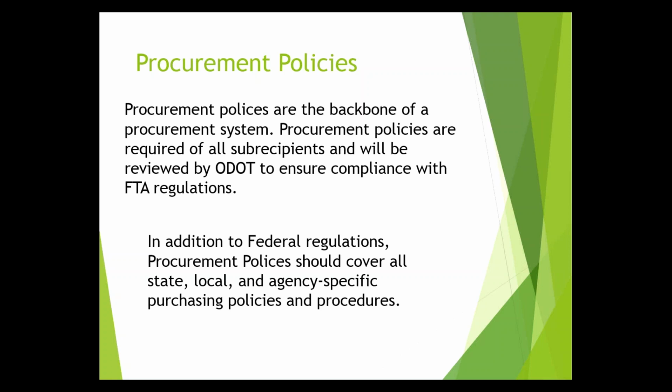In the course of reviewing some policies, I have found a couple where the small purchase level is anything under $5,000. That would be considered less restrictive. We're really concerned with how we're managing FTA funds. So you have to figure out, in the use of FTA funds within your local policy, you need to be using FTA guidelines. So $3,500 is the micro purchase level.